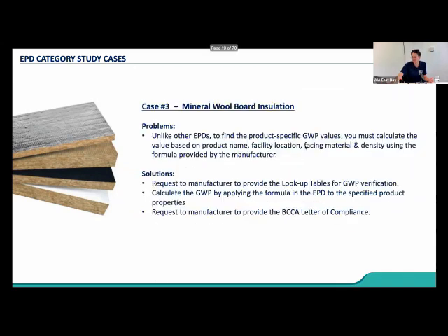And so one of the recommendations that we provide is to ask Rockwool to get involved in a situation like this, or ask your supplier to help you navigate these tables. I guarantee most of the major mineral insulation providers have thought about this already and can probably navigate the project team towards the correct answer. So making sure that you have that second opinion and making sure it's correct is really important. And I think in this specific project, which is called RBR, we actually got a letter from Rockwool which said this product is compliant. Let me spell it out for you on why it is, which was really helpful for proving that to the AHJ that we are compliant with regulation.